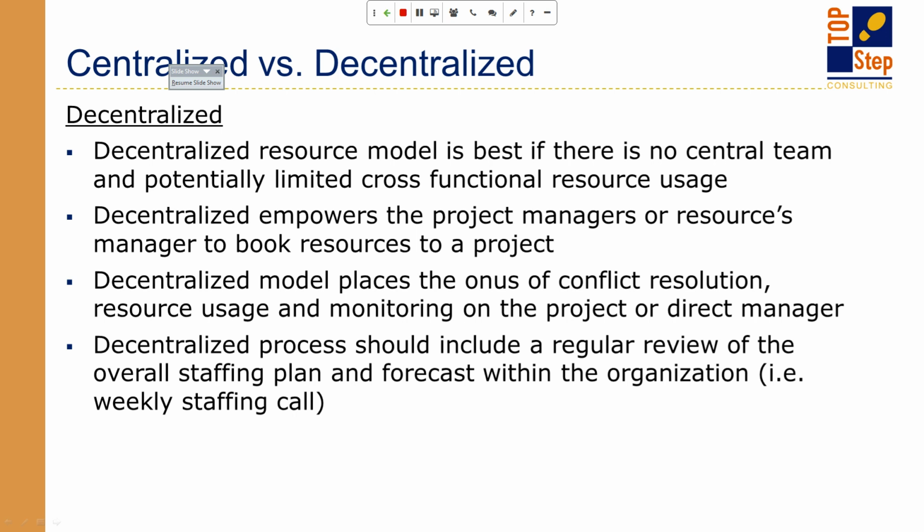Each individual skill set, particular client requests, coming directly to the project owner. Maybe there's a hardware issue that so far only the project owner knows about, and that's going to cause a delay where everyone's bookings need to get shifted out until that issue is resolved. So things like that, where the knowledge rests in specific individuals, you can grant those specific individuals the ability to create and manage their own bookings.